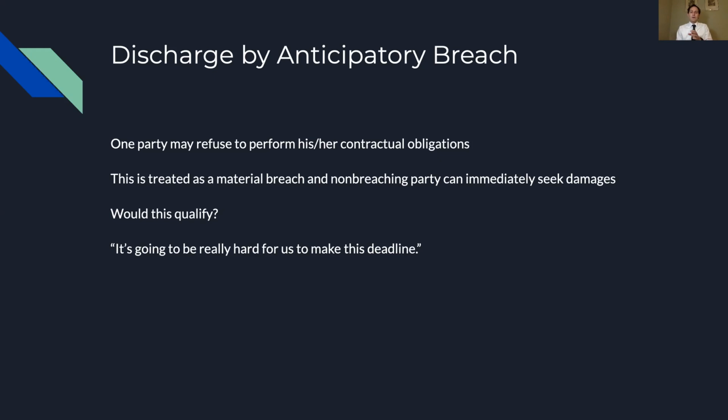Okay. So once you tell me that you can't do it, I can say, okay, you've breached. I'm going to get somebody else to get my cookies. And maybe the only other person that I can get to get me cookies by 4 o'clock is somebody that's going to charge me $20 instead of the $10 that you were going to charge me. So what does this mean? Well, we'll talk about this when we get to damages in a little bit. It means I'm going to pay this other person $20 and then I'm going to sue you for $10. Again, would I actually sue you for $10?